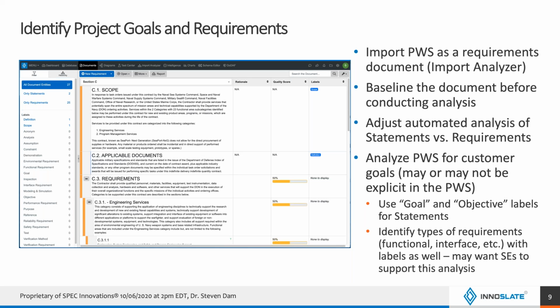And we have a quality score for you to use for the purposes, not necessarily scoring your customer, although it works for that too, but also for the ability to help you identify where there might be potential ambiguities and problems in the way the requirement is stated. So you can spend some time talking to the customer, or if it's during an RFP phase, ask questions of the RFP to get clarifications that you need. And so that's very helpful to do that analysis early in the cycle.